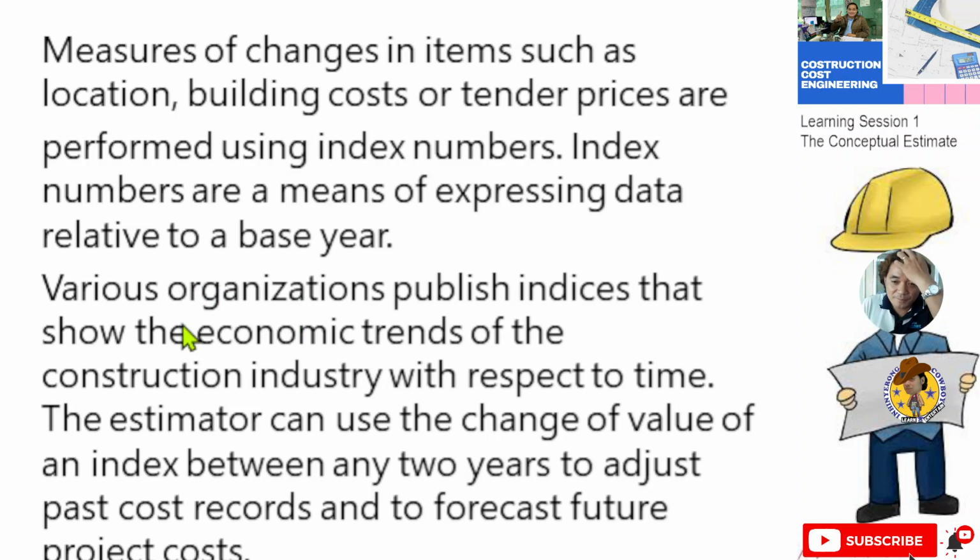Various organizations publish indices that show the economic trends in the construction industry with respect to time. Then the estimator can use the change of value of an index between any two years to adjust past cost control and to forecast future project cost.